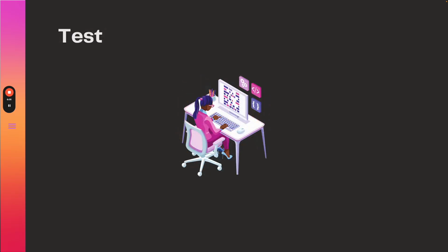Next, and very, very important, is the testing. This is potentially where a product either succeeds or fails. Testing generally takes place after the build of a product, but in reality it's sometimes impossible to separate this activity from the build activity, as the two are very closely coupled. There are various types of testing that should take place, and these generally are unit testing, which focuses on testing the components of a software solution, often in isolation of any other components that are being built. These are often performed by the person who creates that specific component, but should ideally be performed by a peer on the project, just to ensure that there are no blind spots.